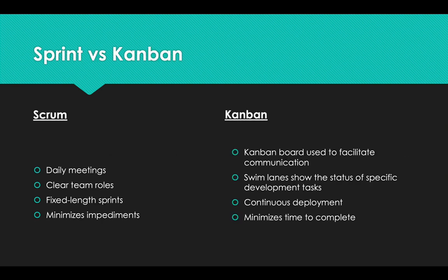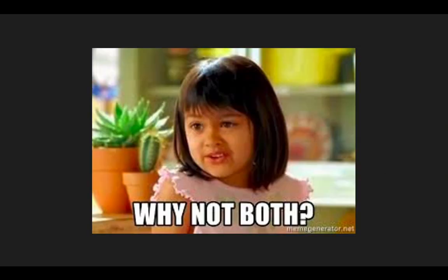So if you line these things up and compare them side by side, really the differences become pretty stark. And so you might hear people use Scrum and Kanban interchangeably, which is absolutely incorrect. They have different ideologies, they have different concepts about what is really important. While Scrum really optimizes communication, Kanban really optimizes efficiency in a lot of ways, or throughput of the team. So these are definitely not the same thing, but there's also kind of a false dichotomy.